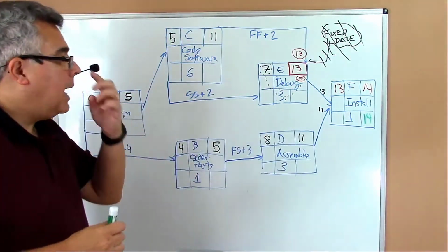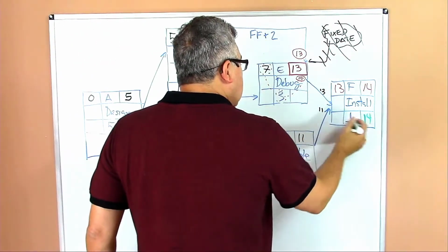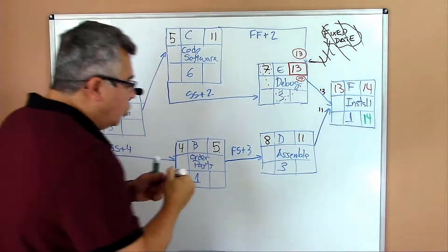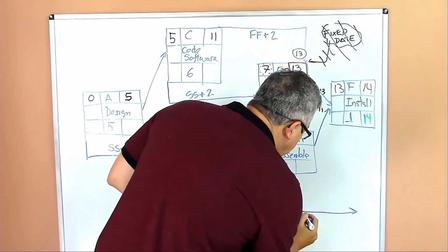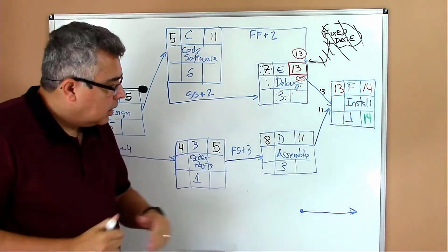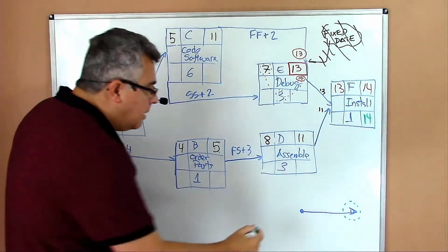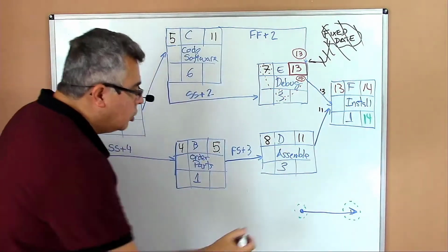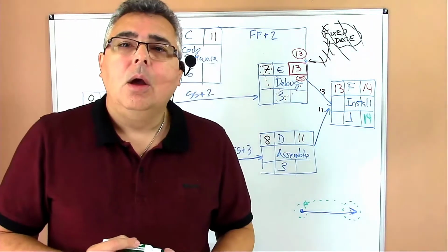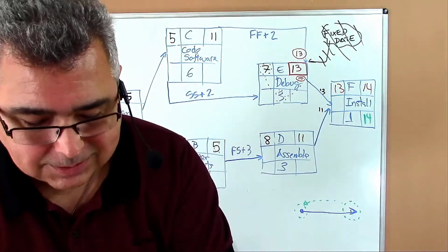Now let's move back and do the backward path. In the backward path, we move back. I want you to pay attention to one thing. You have the arrows, okay? That's the arrow that you have in the network. Always start with the arrow and come back to the starting point. So try to pay attention in the backward path to move back on the arrows. And I tell you that because that's an important detail to understand.